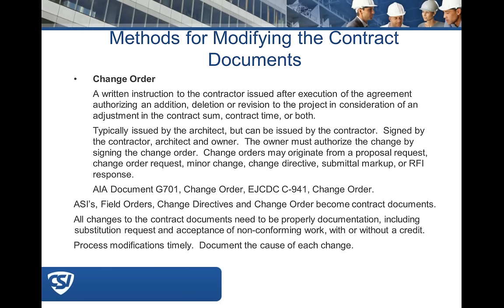Kevin notes that the AIA and EJCDC change order documents are very similar. He also offers a distinction: when a product is equivalent as determined by the AE, it's an 'or equal'; when it's not, it's a substitution. How those terms are defined in your front-end documents matters. In our documents, if it's not a specified product or manufacturer, it's a substitution by definition.